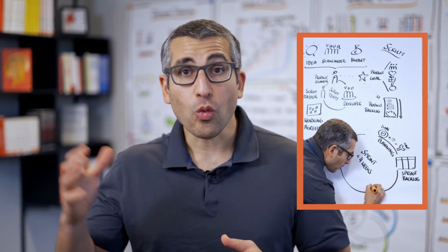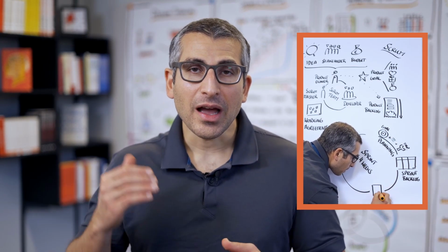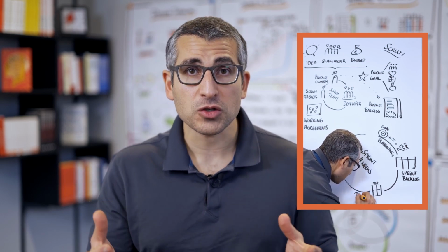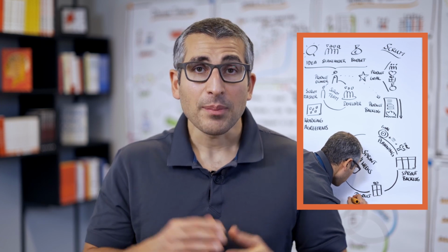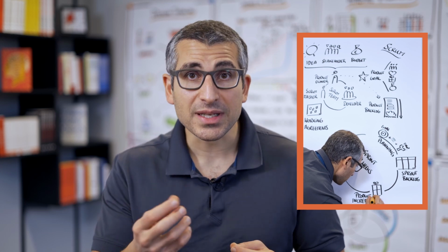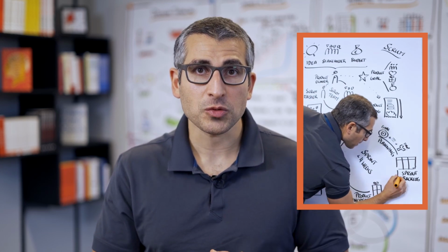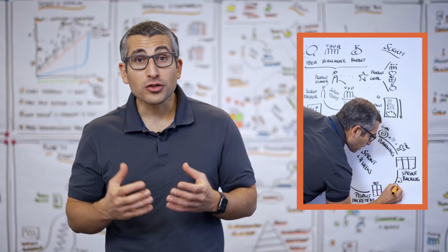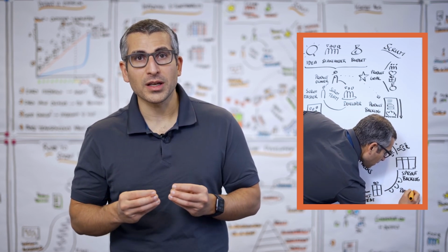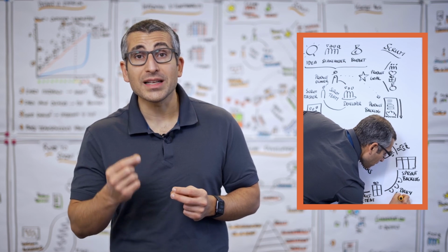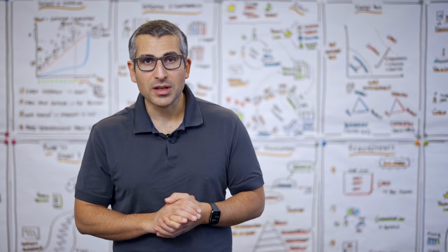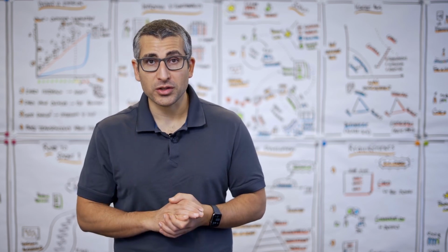After sprint planning, with our sprint backlog right next to us, the team moves into execution. I refer to this phase of the sprint as the delivery phase, because we have the intention to deliver a product increment, a subset of our product by the end of this sprint. In order to move synchronized throughout this delivery phase, every good Scrum team does daily stand-ups or daily Scrum meetings on a daily basis.